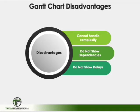Gantt charts did lose their appeal in construction early on because, as projects became more complex, these charts did not show the dependency that one activity had on another. In other words, if one activity was delayed, future activities were not moved down the timeline. But most of these disadvantages have been addressed in many of the current software packages that use Gantt charts.